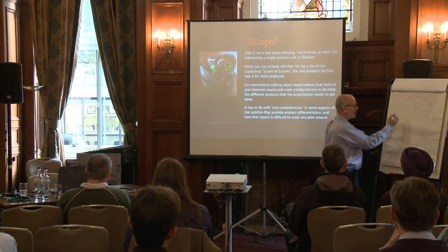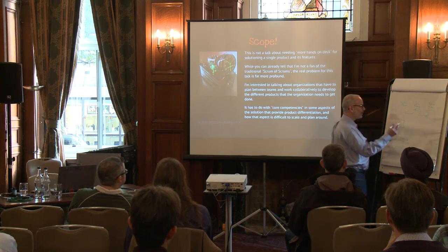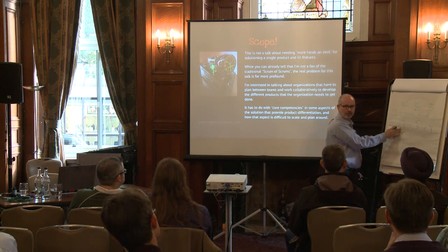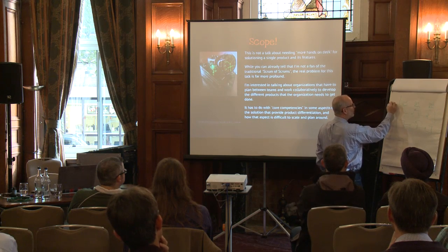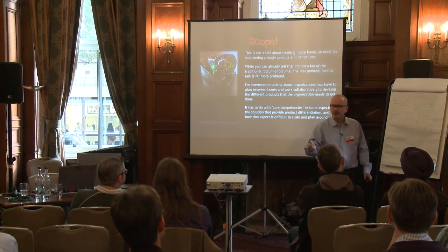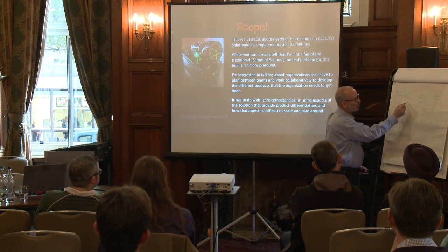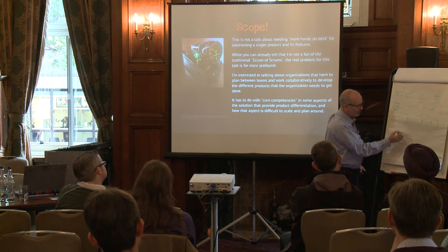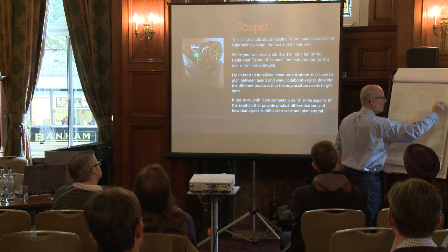What Craig will say, what I'll say also, is that if you're trying to scale this so you need more teams, the stuff that works, again, in small settings, respecting that communication stuff, is it's possible to have the teams working in parallel. This is where architecture and planning comes in handy. I wish I did some of that. And then before you go into that, you have to have some joint planning. So it'll start off in a scaled environment where we're having several Scrum teams that are trying to work on the same project. There's a common product backlog. Craig will call these, instead of sprint teams, feature teams. But we're going to partition the work that's out here into something that makes sense for each of the sprint teams to work with. The sprint teams will actually then do detailed planning. And then they'll go through, at the end of the cycle.